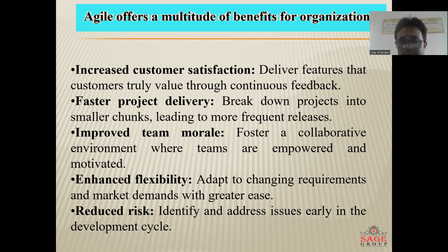Each iteration is intended to be small and easily manageable, and can be completed within a couple of weeks only. At a time, one iteration is planned, developed, and deployed to the customers, and long-term plans are not made in the agile model. We follow steps like requirement gathering, design, construction, testing, deployment, and feedback.